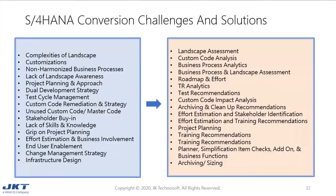We have listed all possible S4HANA conversion challenges based on our past project experiences and come up with solutions through accurate assessments and SAP recommendations. For dealing with landscape complexities, we have landscape assessment as the solution. For customization challenges, we do custom code analysis. For non-harmonized business processes, we do business process analytics. For pain points such as dual development strategy, we have PR analytics in place. For unused custom code, we have the custom code impact analysis tool. For infrastructure design, we have archiving and sizing in place.